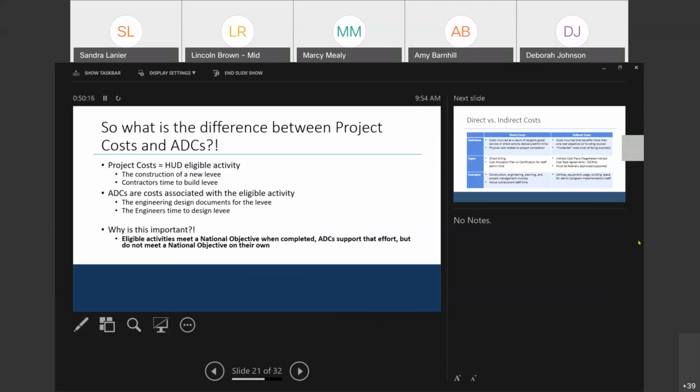Okay. Hey, Marcy, this is Brandon Jensen at SimCog. So I guess I'm struggling with understanding procurement compliance in preparing this application. In the risk analysis section of the mitigation and DR infrastructure narratives that are required to be submitted, we should not include any references to the RPC's ability to help the UGLUG administer this project if we intend to be procured competitively rather than being included as a sub-applicant, correct? Correct, unless the UGLUG has procured for that and pre-selected that contingent upon award, and then they can attest to that and allude to that under the risk management questions.